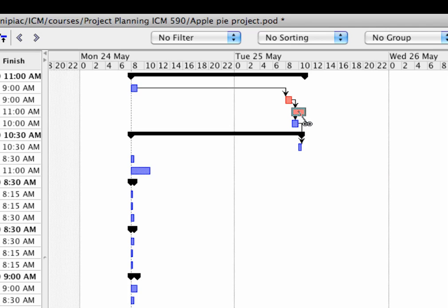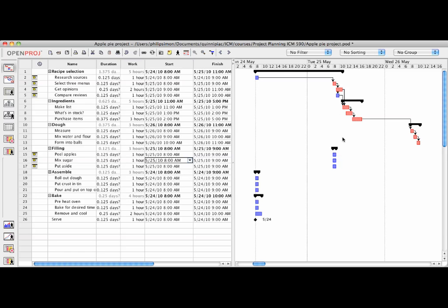So if I drag this one to this one, now I have a double dependency on one item being dependent on two things happening. Well, another way to approach the chart rather than drag dependencies all over the place to move things along is to use the start date as a way to move things on the approximate day you think things are going to occur.